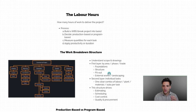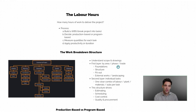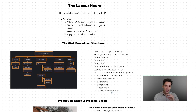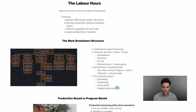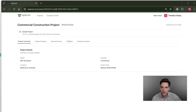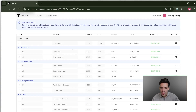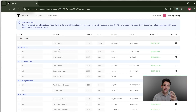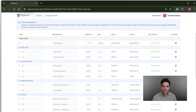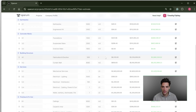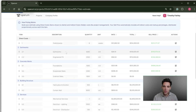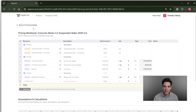For example, you could take a construction project and break it down into foundations, structure, fit-out, external works, and landscaping. Then within foundations, break it into separate slabs, and each slab has a combination of concrete works and productivities. The work breakdown structure is one of the most important concepts in construction project management — it drives our estimates, schedules, costs, control, quality, and procurement. In my estimating software, a commercial construction project example might be broken down into earthworks, concrete, building structure, services, finishes, and external works, each with a worksheet containing labor, materials, subcontractor, and plant calculations.